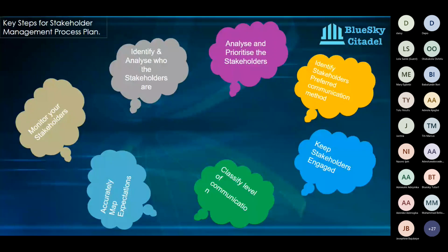How often do you want me to reach out to you? The participants of each mode of communication. So I have two stakeholders that I'm reaching out to on the same issue. If Bolu and Deji, for example, are stakeholders that I've gathered requirements from, and they have a similar level of interest, and I need to pass an update to Deji, I need to also pass the same update to Bolu. Then I want to make sure that if I'm sending that update to Deji, Bolu is copied in that email. It's not like I'm sending to Bolu separately and to Deji separately. They're both copied in that email. And again, finally, distribution for the communications as well. Okay, so I'll move on very quickly from that.